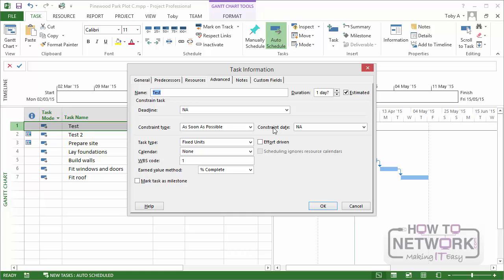The requirements could include the availability of resources, and they could include dependencies. We looked at dependencies earlier on, we'll be looking at them over the next couple of sections in quite a lot of detail. So when all of those requirements are in place, the task can start. Now as soon as possible basically means that.